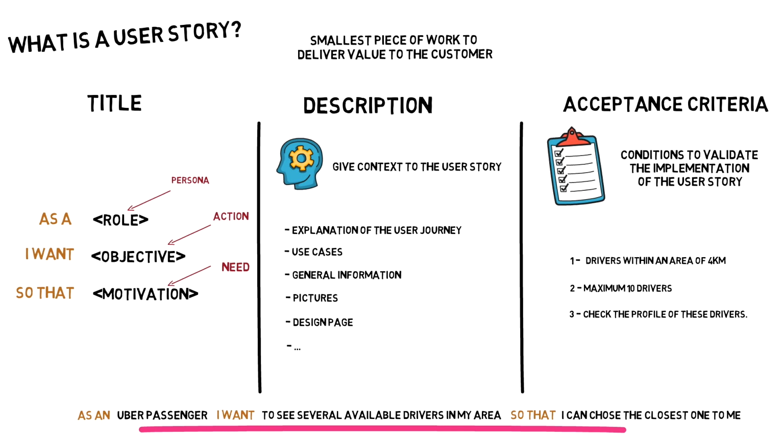We are able to understand the value of a user story with the title and description, and the acceptance criteria help us understand some key characteristics that require special attention during implementation. So going through the acceptance criteria with the team at the time of writing the user story is the best way to fully develop the functionality.